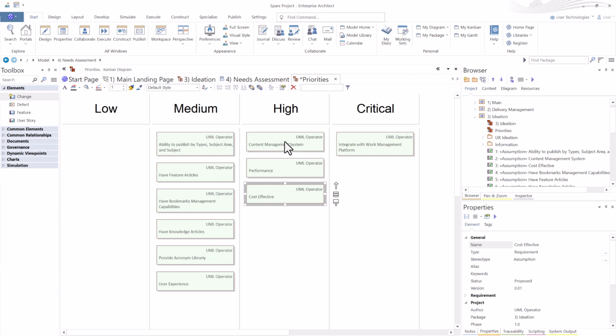You ask the client, in order, what is the priority of these three things: cost, schedule, performance? They tell you, well, we don't have a lot of money, so budget or cost is number one. As you're going through the exercise and determining through software estimating that it's going to exceed a cost threshold, it's going to exceed the schedule.